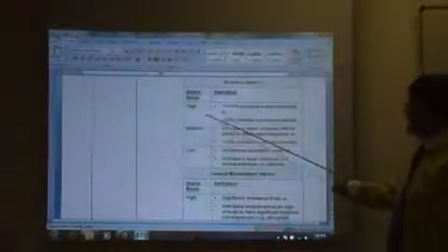If you look at the high risk, you'll see there's a greater than 25% increase in overall schedule. And you know the schedule is a constraint on your project, and anything greater than that is regarded as a high risk. So you can clearly see that each and every knowledge area in terms of risk management is addressed in the risk management plan.